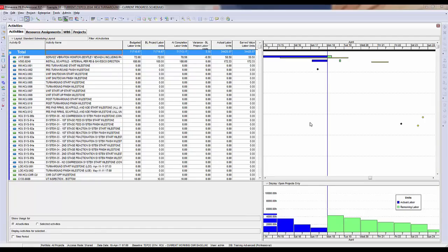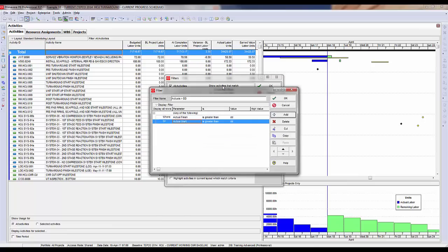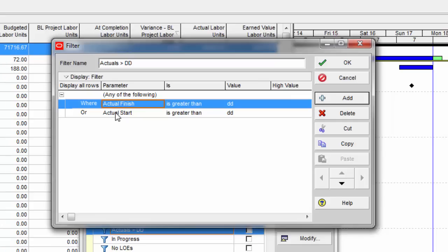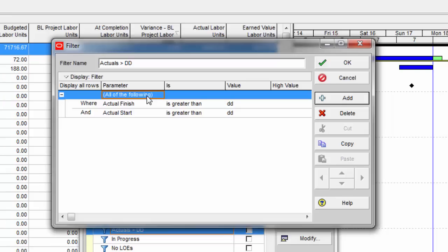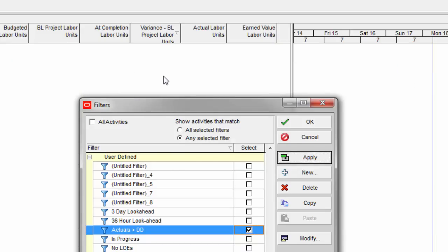Before running reports for an updated reporting cycle, there are a few quality checks I do in P6. First, I make sure I don't have any actual dates or actual hours ahead of the data date. I build a filter called 'Actuals Greater Than the Data Date' — set to show 'any of the following' where actual finish is greater than the data date OR actual start is greater than the data date. Make sure it says 'any' not 'all.' If I apply this filter and see any activities, I need to correct those dates to be behind the data date.